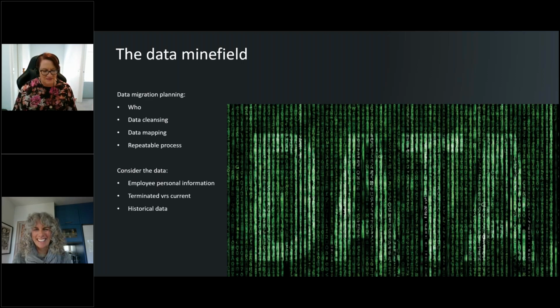The data minefield: who's going to be doing this? Data migrations are really complex and require moving and manipulating data from one system to the next. It's often not just take this piece and put it there. It may need some manipulation or some mapping along the way. If there is one aspect of the project that's going to take longer than planned, we typically find that it is data migration. Once we get into the process of extracting data from your legacy systems, it's not as easy as people thought. So just really have a think about that.